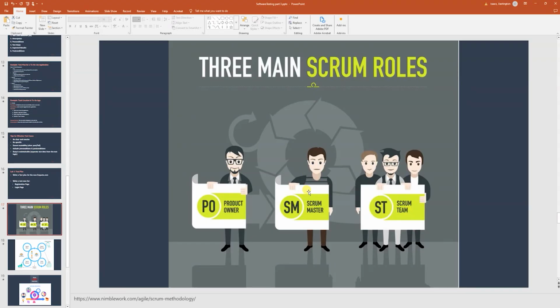Then the product owner also states, okay, this is how we're going to break these requirements down into different user stories, which are different small chunks of work, and then we're going to do only 3 this week and 3 next week and so on. It plans how they're going to solve that problem, and then discusses it with the team, and the team all agree on how and when that particular feature will be delivered, right?